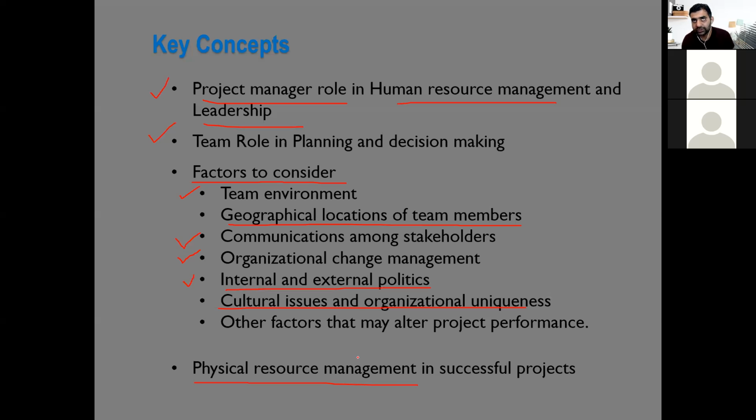We talked about the suppliers, the relationship with the suppliers, and why they are important. Early planning for the physical resources is also important, so that we have the lead time, and our equipment, machinery, and tools are available when they are required on the site for the team. So these were a few concepts we discussed yesterday.